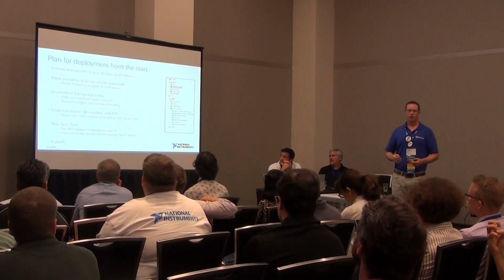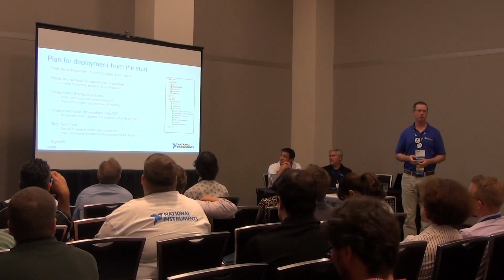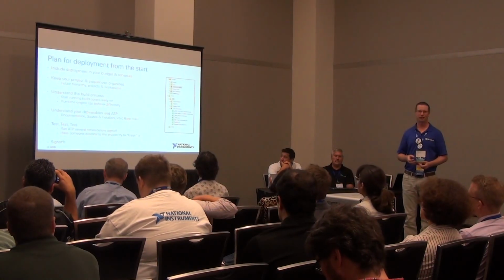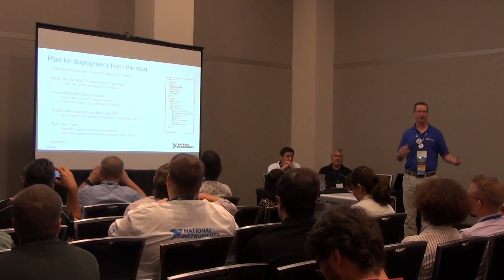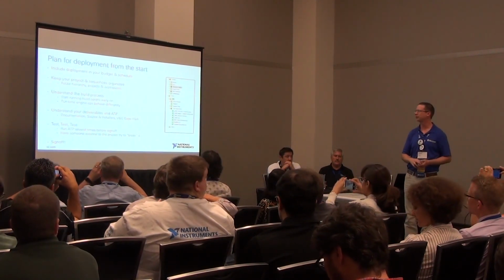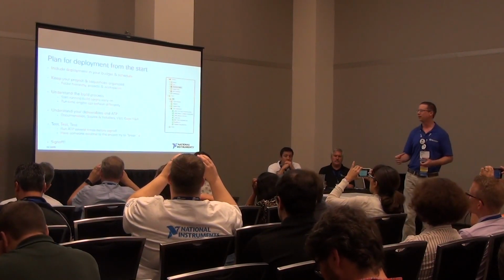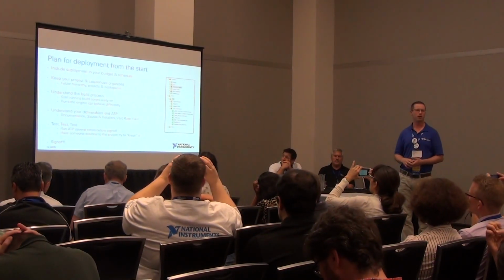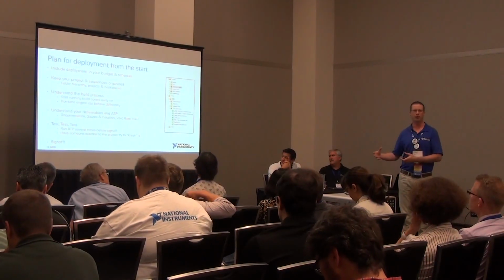So, beyond just the software, deployment is often a huge undertaking. Installers can take several days to perfect. Sometimes you need to pull in hardware documentation from multiple sources. You need to make sure that you have an ATP that you can use for sign-off. And so, including deployment in your budget and in your schedule can really eliminate a lot of that last-minute stress.